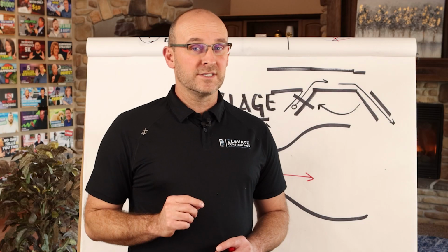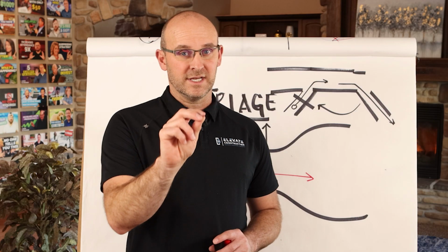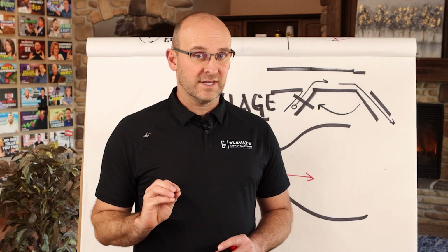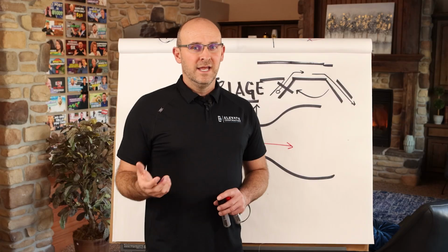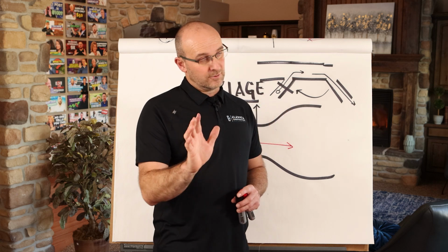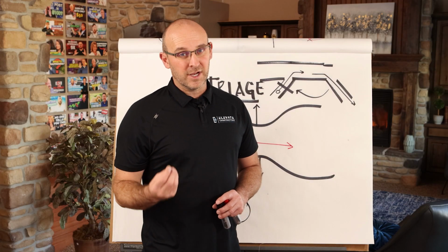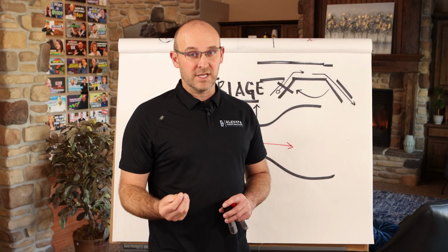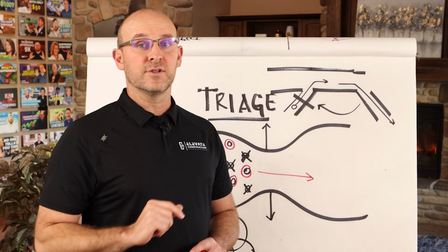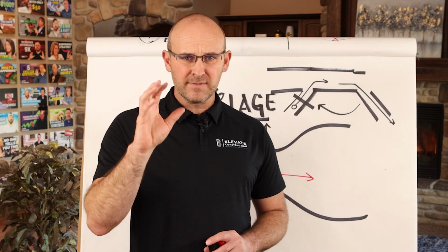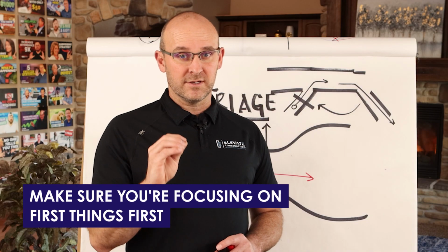You can look at this from a project level as well. Let's say that you have your foundations, your superstructure, your interiors, exterior, commissioning, and site work phases, and you have this one-off project like a guardhouse or a pool or something like that. If you're going to rush and push and panic, which I don't recommend anyway, workers to start everywhere all at once, be in every zone, that's not prioritizing, right? You must triage and understand where's your path of critical flow and work on first things first. And also with a foreman, you need to make sure that within your crew, instead of getting again in the thick of thin things, make sure you're focusing on first things first.